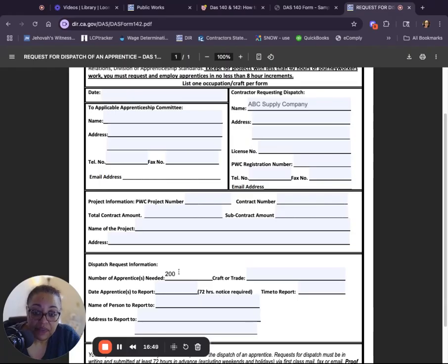And if they send out even a portion of that, because maybe you didn't catch it, maybe the union was like, I'm not going to call, I'm just going to send people out. Our client, ABC Supply Company, is going to have to pay a 4-hour shift for every single apprentice they sent out that wasn't needed. And if that apprentice did not have a proper journeyman to watch over them, they're going to have to pay them the journeyman rate for at least 4 hours. So it really pays to pay attention. Make notes for yourself for your project.